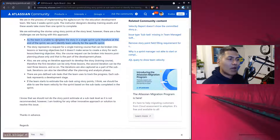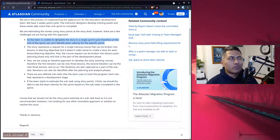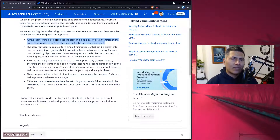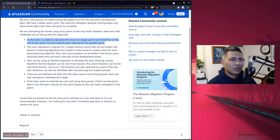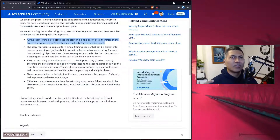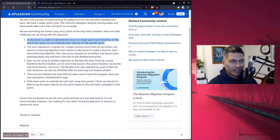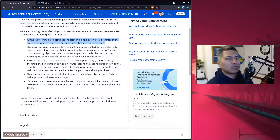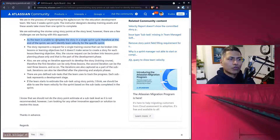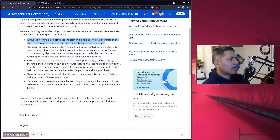Usually you will need more than one sprint to complete one epic. There is no hard and fast rule, but a story is supposed to finish in one sprint and epics are supposed to finish in one program increment if you're following SAFe — or roughly one quarter, about three months. So use epics in this particular case.